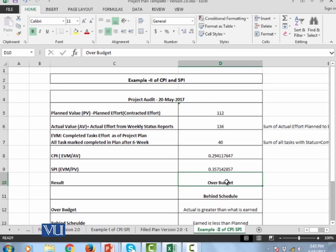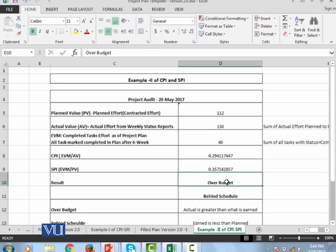Now the project is required a very strong corrective action, and this indicates that now you need to do more frequent audit, Earned Value Management. You won't be doing that after one month. Now in this case we will be on weekly basis so that we know that the project which we have corrective measures is not in the right. For example, unusually effort complexity increase and something like this.